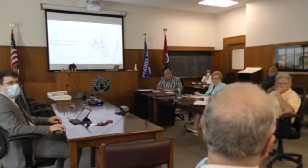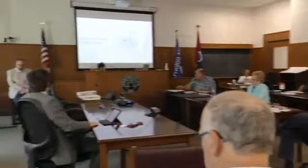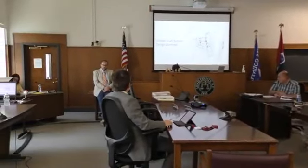We're bumping our capacity up by 4,000 gallons from what we have right now. So you'd still be three ahead if you drop down to that. Oh, no, it's 4,000 at the 18,000 mark with the two 9,000 gallon tanks. We're 4,000 gallons more if we drop to the 9, dropping 1,000 in each tank. So we have 14 right now, instead of going up to 20, we've got 18. Right, save $36,000. Okay.